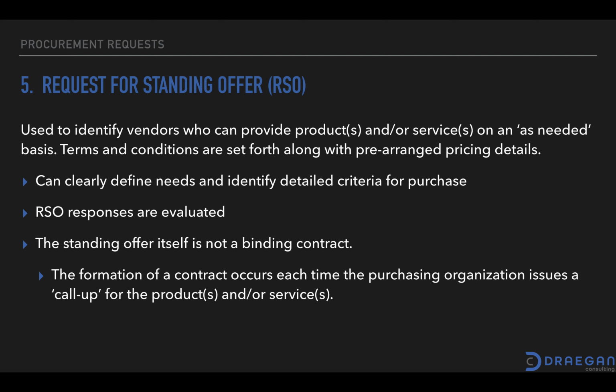So there isn't a contract in the actual RSO itself. The contract is created once the request is made to call up, as it's referred to, those products or services. A lot of organizations who have multiple serial type needs for things that are very consistent can set up RSOs for a variety of things, whether products or services.